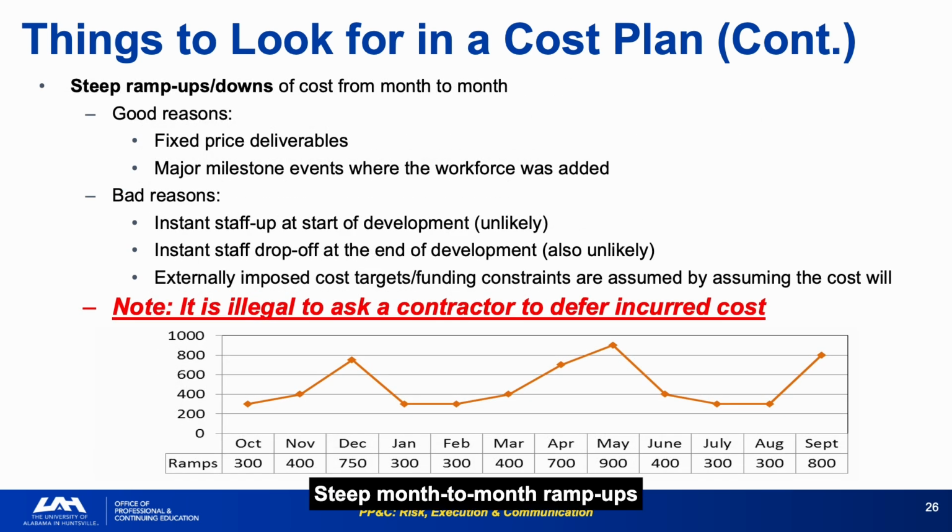Steep month-to-month ramp-ups or ramp-downs in cost plans require a specific legitimate justification, fixed-price deliverables, or major milestone workforce events, because instant staffing changes are unrealistic for development programs. The legal reminder here is important and often unknown to analysts. It is illegal to ask a contractor to defer costs already incurred.